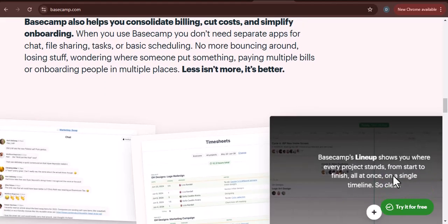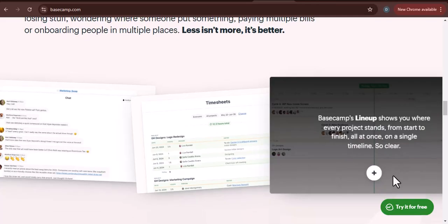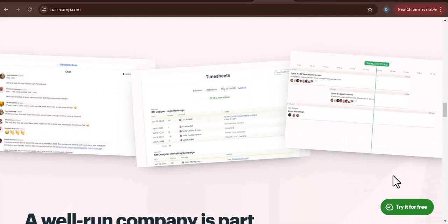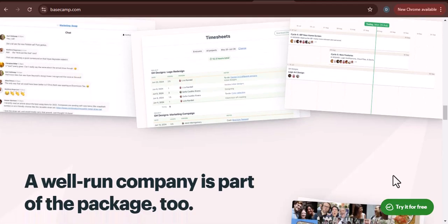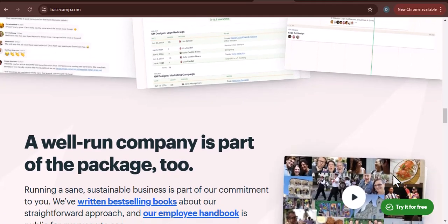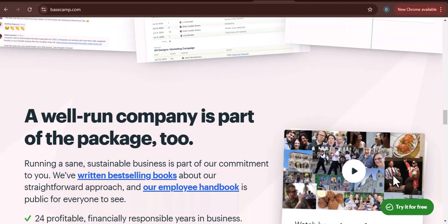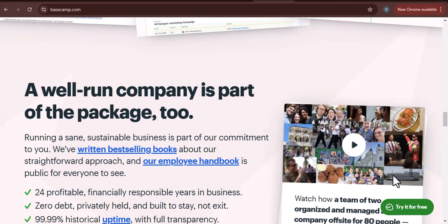The simplest method involves using comments on tasks or to-dos. When someone completes a chunk of work on a task, they can leave a comment like, "Worked 2 hours on design mockups," or "Spent 1.5 hours on content writing." This requires discipline and consistency from your team, but it's a zero-cost solution that keeps the information within Basecamp.